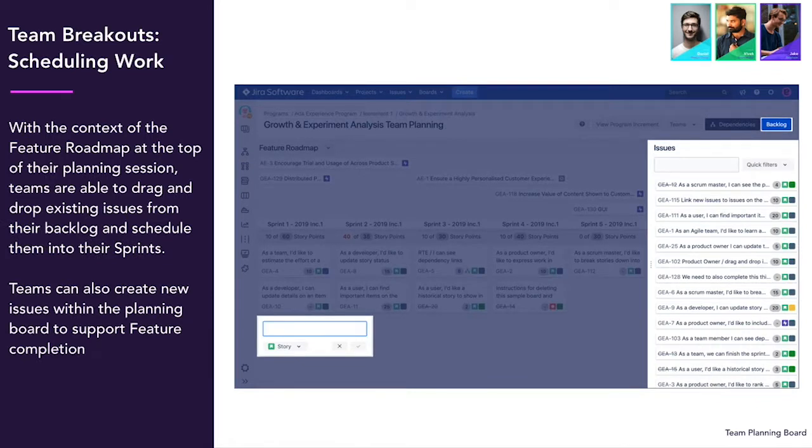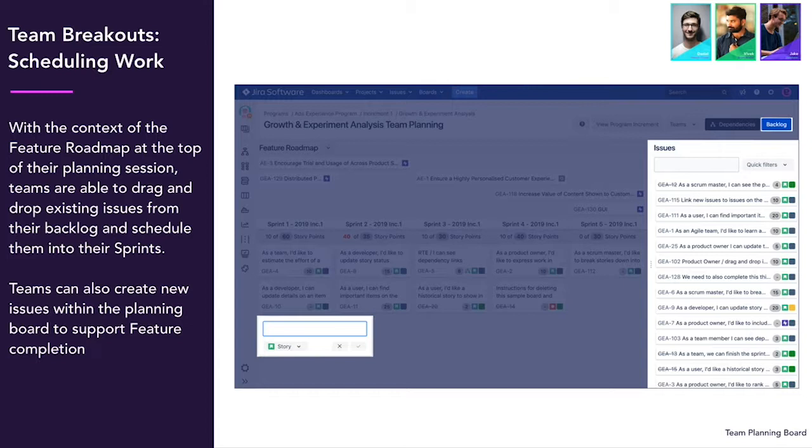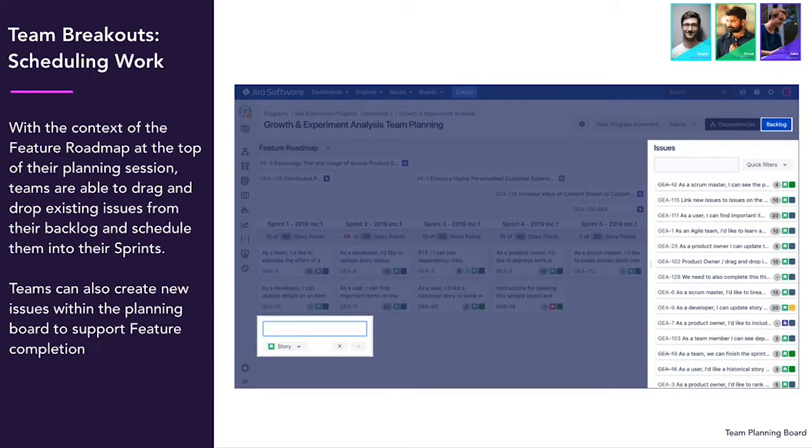In these team breakout sessions, you can also start to schedule work. With the feature level roadmap in view at the top of the screen, teams are able to drag issues from the backlog into each sprint, edit story points and even add new issues.